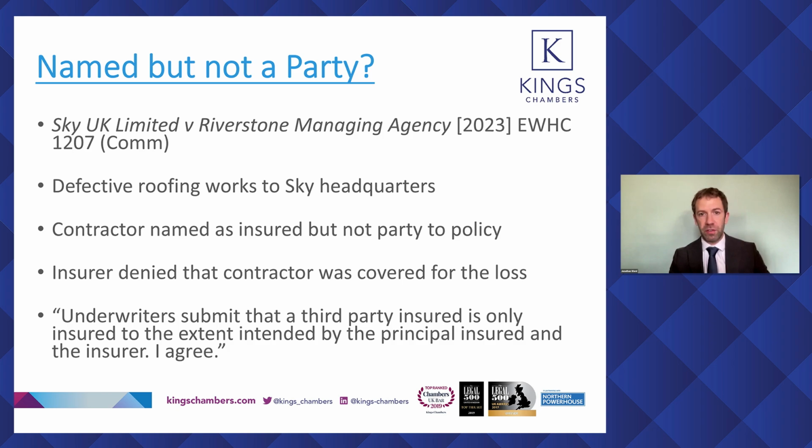I think the decision of the Court of Appeal in RFU came out just before this case. And Judge Pelling concluded that in order to determine the interest of someone who was named as an insured but wasn't a party to the policy, you had to ask what had been agreed as between the principal and the insurer.